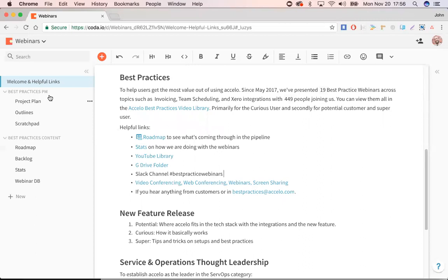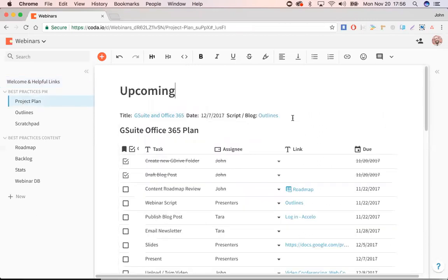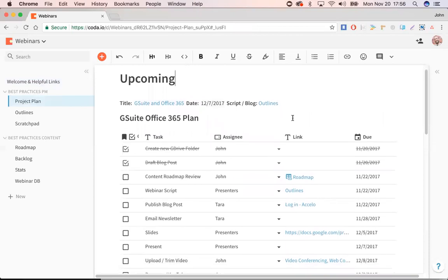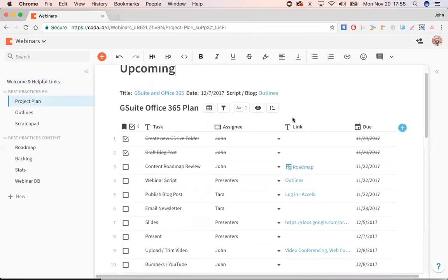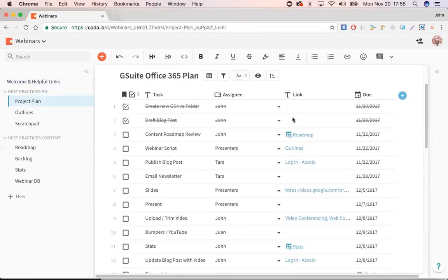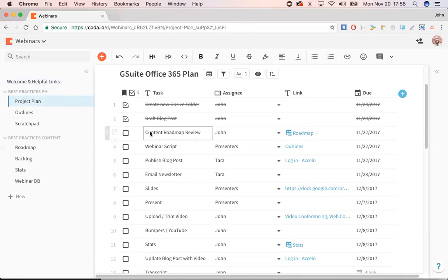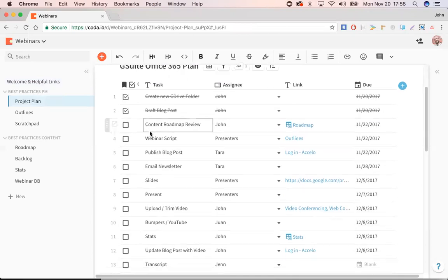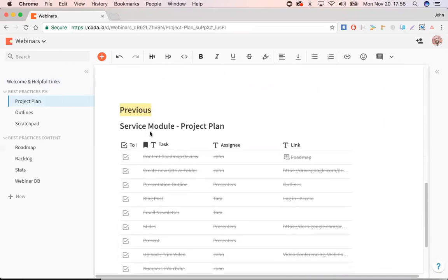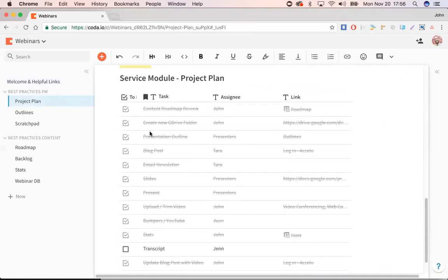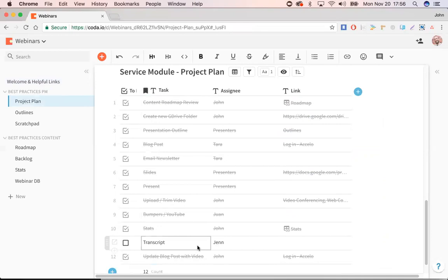One is the project management piece. So in the project plan, what I do is I have a little spreadsheet for each of our best practice webinars coming up. So here, the G Suite and Office 365 one, we've just started it. We haven't developed the content yet. Whereas in the previous one in the service module, we've gone all the way through, but we're still waiting on Jen to complete the transcripts there.